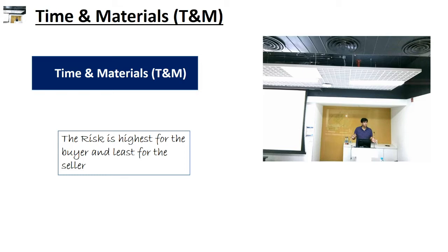In a time and material contract, some of the risk of the buyer can be mitigated by adding a not to exceed clause. The time and material not to exceed is a contract in which the seller can bill the work being performed, but there is a cap that could be used as the maximum amount being charged by the seller. This type of variation can be used to increase the seller's efficiency and it assumes the excessive cost. It also provides the buyer with a cap that will guarantee that the seller will not exceed that cap.